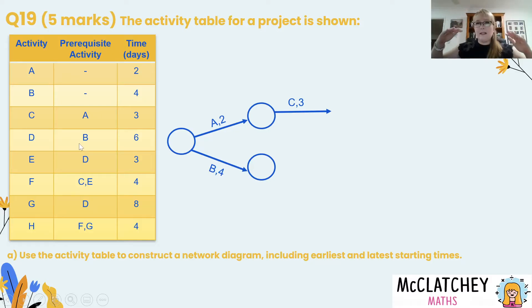So I always like to progress down my table but also looking at where in the diagram I'm going to draw these things. D comes out of its prerequisite activity of B. So far so good.